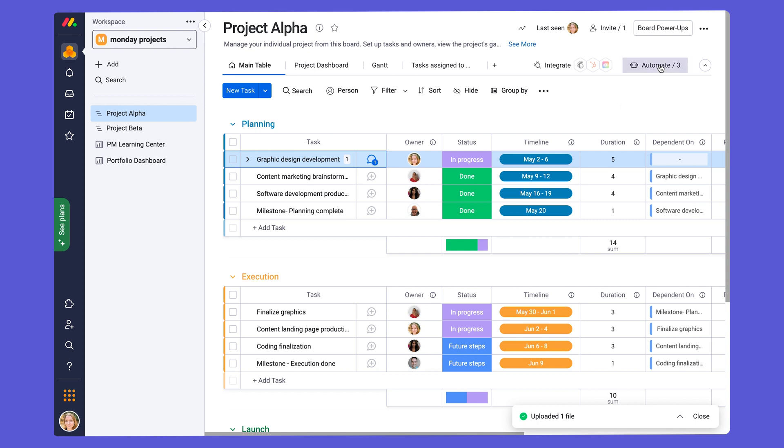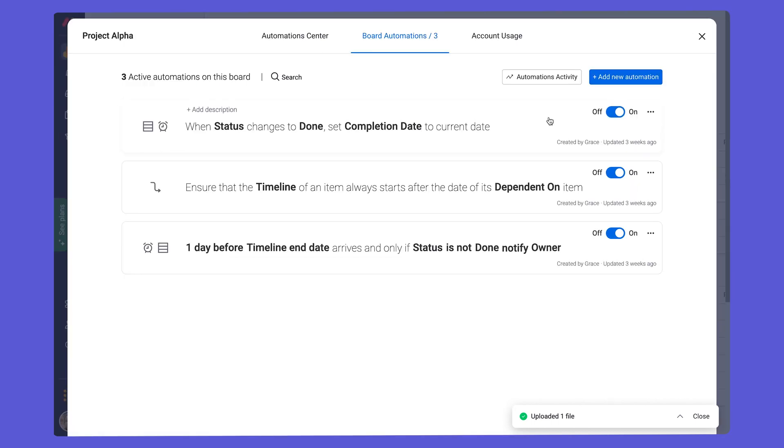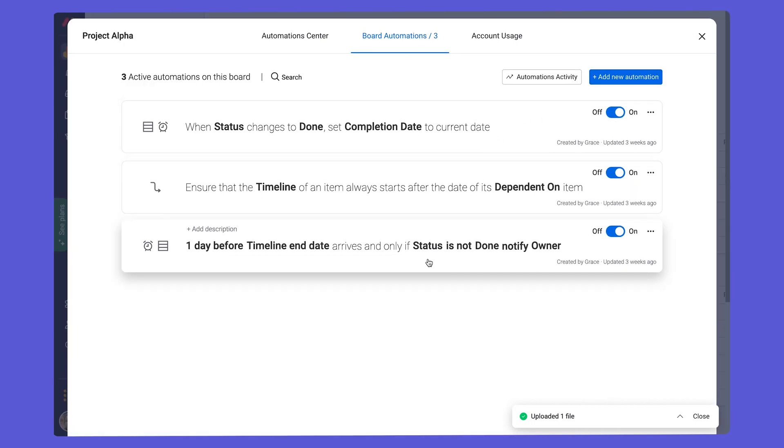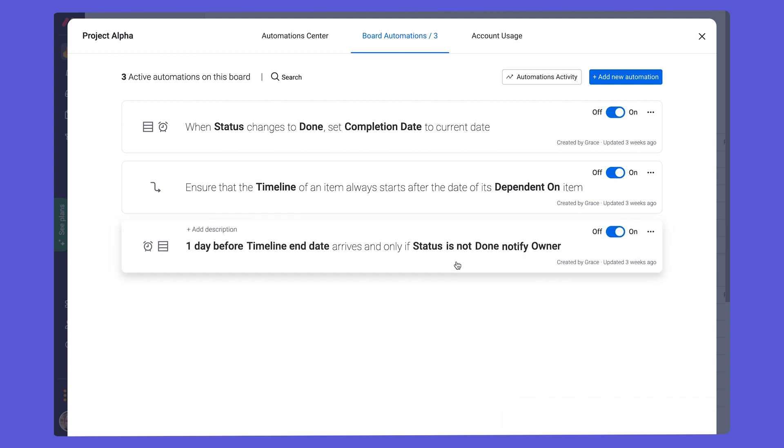If we go back to our workflow center, we can see that an automation that we already have built into the board is one day before the timeline end date arrives. And only if the status is not marked as done, then we can notify the owner. So this means that the owner of a task will be automatically notified one day before the timeline end date. If the status isn't marked as done, it's such a time saver and you can make any other automations like this that will help your workflow.